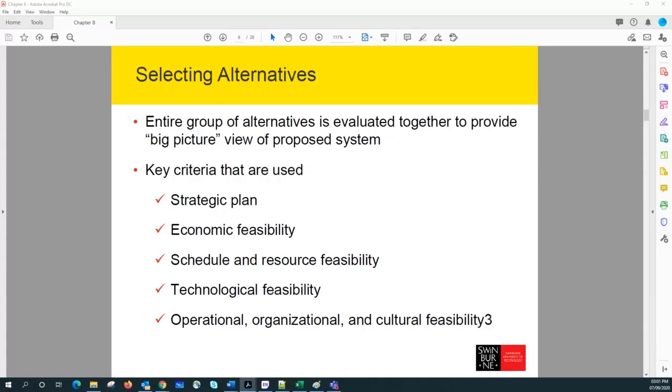And third, of course, we need to think about schedule and resource feasibilities, because if you include advanced capabilities in a system, it not only costs more, but it also lengthens the schedule of the project, right? So one effective method to minimize the immediate impact on the project is to plan for future system upgrades, right? So we can schedule it. All the commercial software developers work in this way. So we can have a viable alternative for in-house development activities.